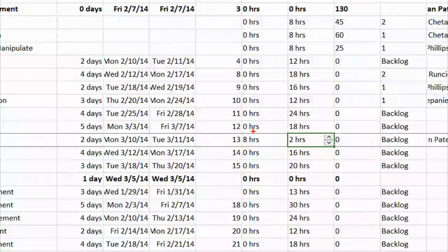So the key is there are some synchronization things that can happen, but right now, at this point at least, this connection is not moving that into a timesheet view, meaning we're not storing it as a timesheet period. It is tracking the actuals. It's actually who actually did it. So your reporting database, your draft, your public database is all being updated, but we're not calling it out as a separate timesheet bucket.